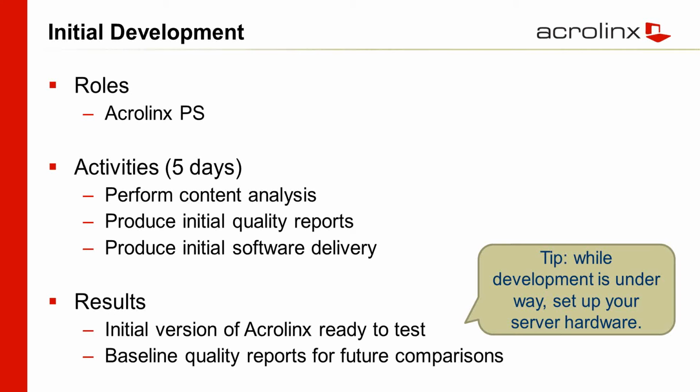Now, during this period, or even before this period, make sure you have hardware set up. Half of the projects that we're involved with get delayed because when we're ready, the hardware isn't. It ought to be the simplest part of a project, but everyone gets frustrated when we're sitting there all ready to go, but there's nothing to run it on.